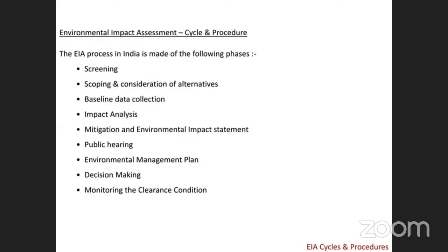The authorities give information to the surrounding people, stakeholders in the EIA making process. The public hearing should be completed within a period of 45 days from the date of receipt of the request from the project owner or applicant. That should be organized by the authorities.